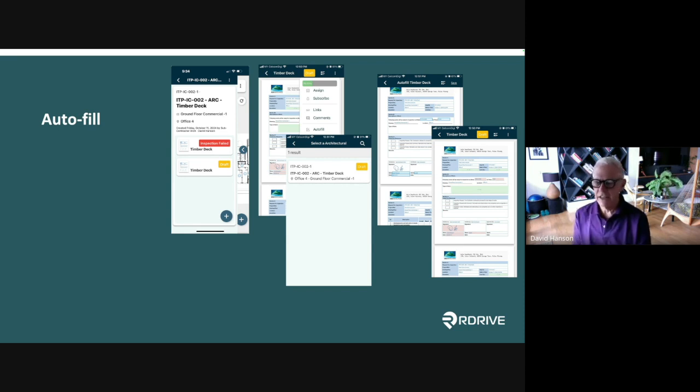So think about site diary reports. One day to the next, the number of people and equipment and whether they're idled may not vary greatly. So you copy from the previous day and say, okay, on this particular day, we've got 2 more people that are responsible for some item and 1 less here. And we have different equipment that's idling. So I can make faster adjustments to the site diary report by using autofill. Any questions about that?